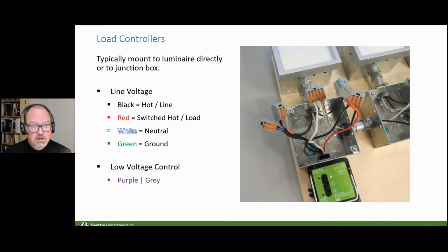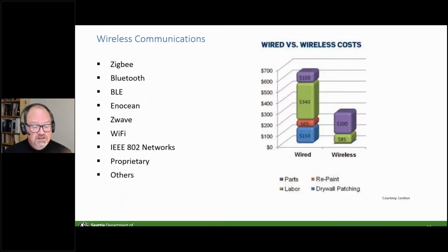Very, very easy. Now, one key thing about this that makes this so wonderful is that you actually have a lot less installation cost associated with wireless switches, wireless dimmers, wireless sensors than you have ever had before, because we don't have to run as much pipe and wire. We don't have to deal with things like touching up drywall, painting, all of these kinds of things.